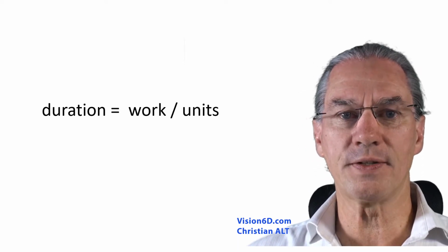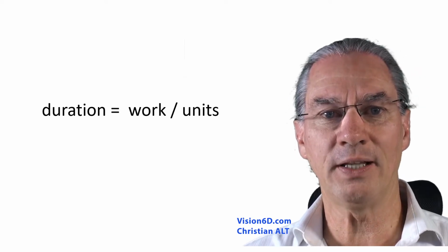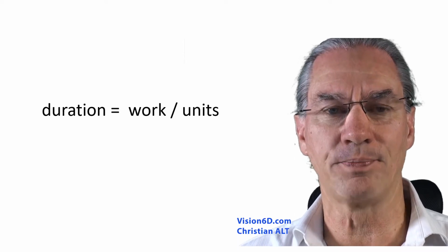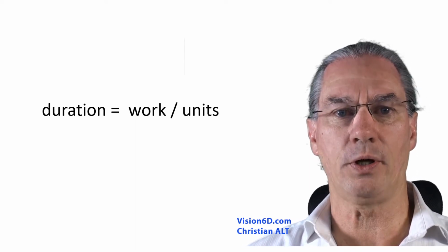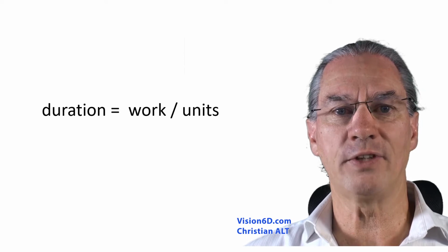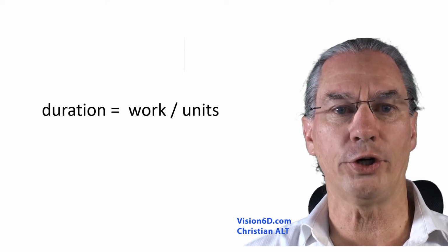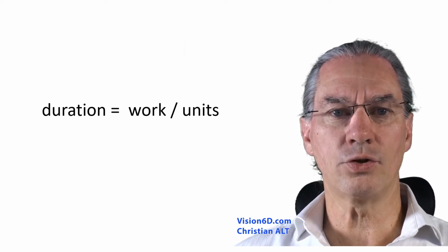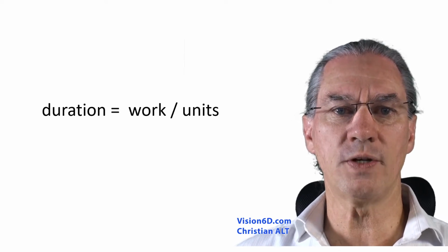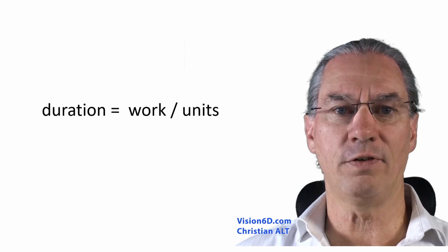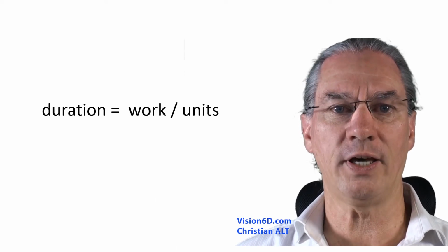To illustrate this, if you have a task that you start on Monday and you finish on Friday, then the duration is 5 days. But if all in all, every day you could just work 2 hours on the task during those 5 days, it's a total of 10 hours, and those 10 hours are 10 hours of work. So in that situation, your assignment to this task is 2 hours a day, which is 25%. Those 25% are the units, 25% of the person allocated to this task.